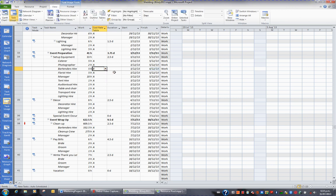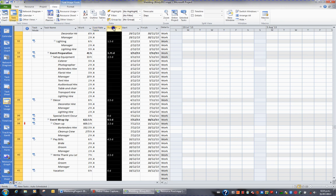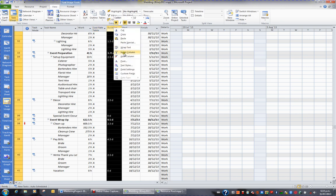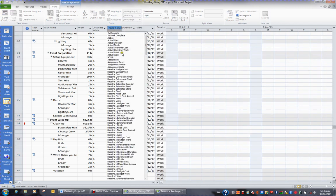If I then want to click on the bartenders, I can change from their A rate to their B rate. But I can't really see what that's doing to the cost. So what I'm going to do now is I'm going to right-click Duration and insert another column, Cost.